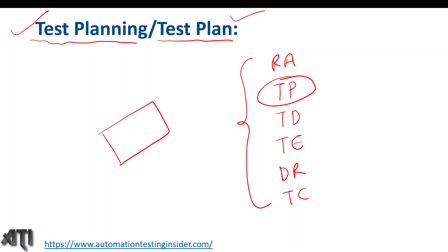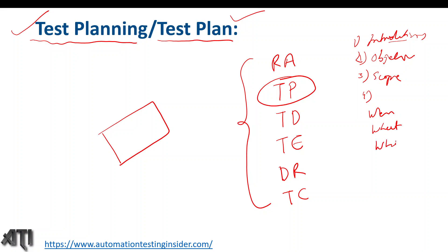Unless we have a proper test plan, we cannot perform proper testing. A test plan is a document which covers all the testing activities as part of test planning. What are the things covered in a test plan document? There are different sections: introduction, objective of testing, scope of testing — what to test, who will test, when to test, and what items are in scope and out of scope. There are around 15 sections in a test plan, more or less depending on the project or company.